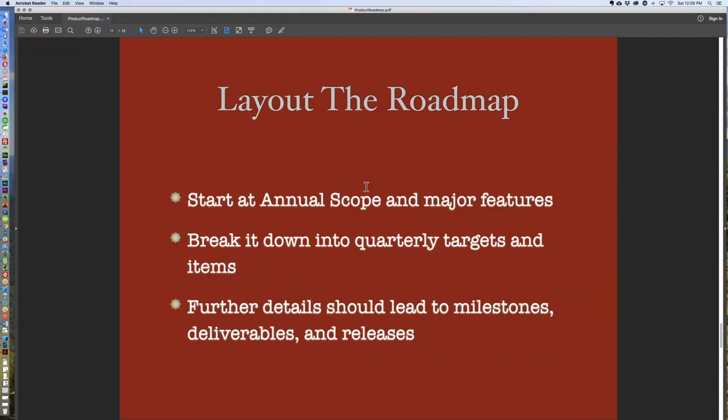That's your annual plan. Now break it down into quarterly targets, essentially. If I'm going to do two this year, I'm going to do one by June 30th, and the other one's going to go out by December 31st. With that, you've got some rough time targets, so you can start fitting in what can fit into version 1 and what's going to have to wait for version 2.